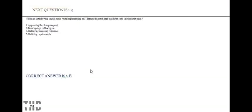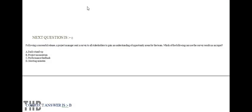Which of the following should occur when implementing an IT infrastructure change that takes risk into consideration? Option A: Approving the change request. Option B: Developing a rollback plan. Option C: Gathering.